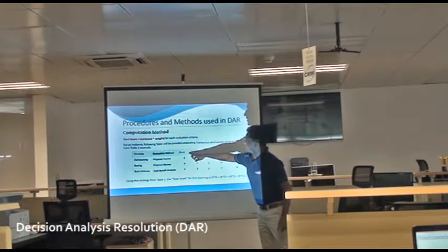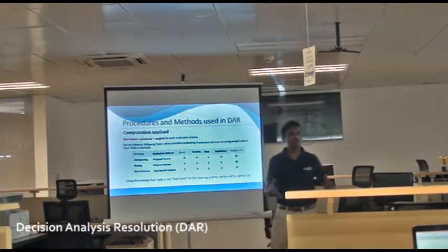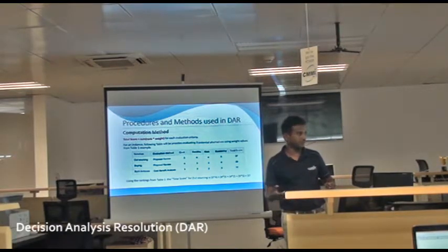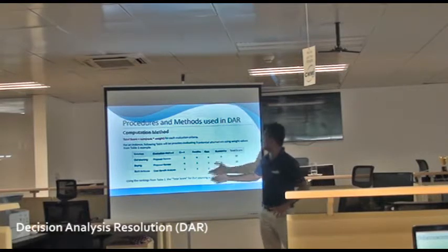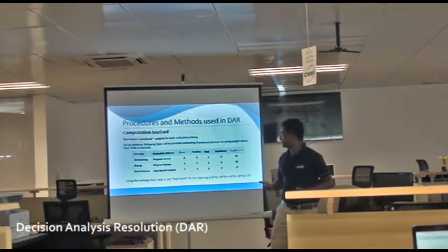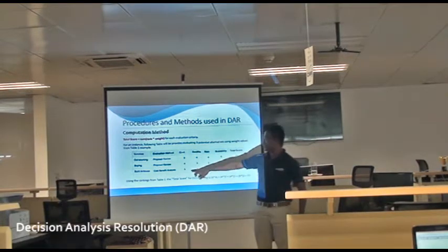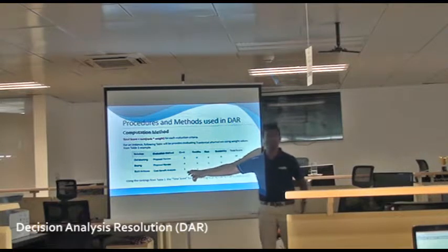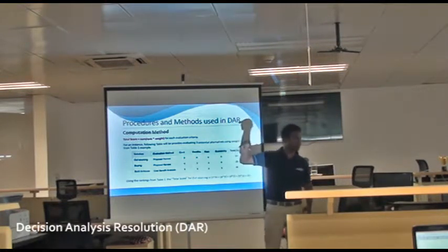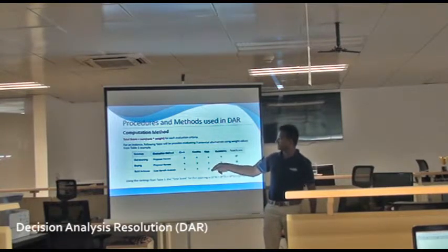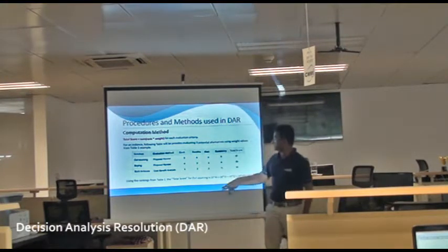Okay, now if you talk to outsourcing, and you see the number 3 there, all right, you discuss with your DAR process owners and DAR team members. Okay, they discuss and give a value. Discuss what the cost benefit is, whether outsourcing has low cost. Alright, let's say outsourcing has high cost, so you give a low value to that. Okay, so in this criteria, doing it in house gets a high value. Here, from the benefit side, outsourcing has more benefits, so you give high marks. Okay, if you take risk, here you have low risk, so when you have low risk, you give high marks. The scalability is the same thing.